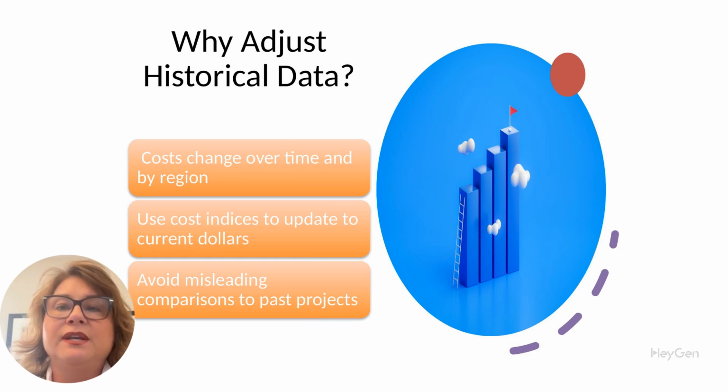Were those costs hard costs only, or did they include soft costs? Were there any special conditions like tight sites, poor soils, or accelerated schedules? If you don't ask these questions, your comparisons can mislead both your team and your client. Always include notes or disclaimers when you benchmark.